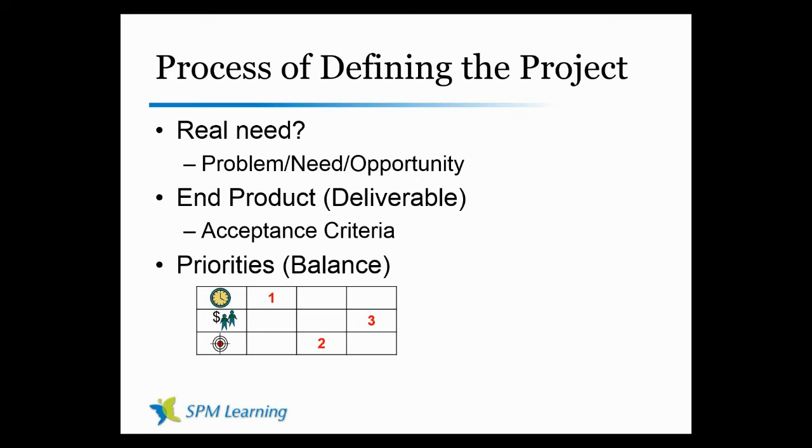The thing is, I need to know that that's what the acceptance criteria is, because if I'm building this to be used in a distant, remote environment that's potentially outdoors by maybe construction workers or forest firefighters, where they're using it out in the field, we're going to need to know that acceptance criteria at the beginning so that we can build to that criteria and then deliver it. Otherwise you're going to get to the end of the project, the customer is going to go, this looks great, let me go try it, let me test it, let me accept it, and oh gee, that's not acceptable.